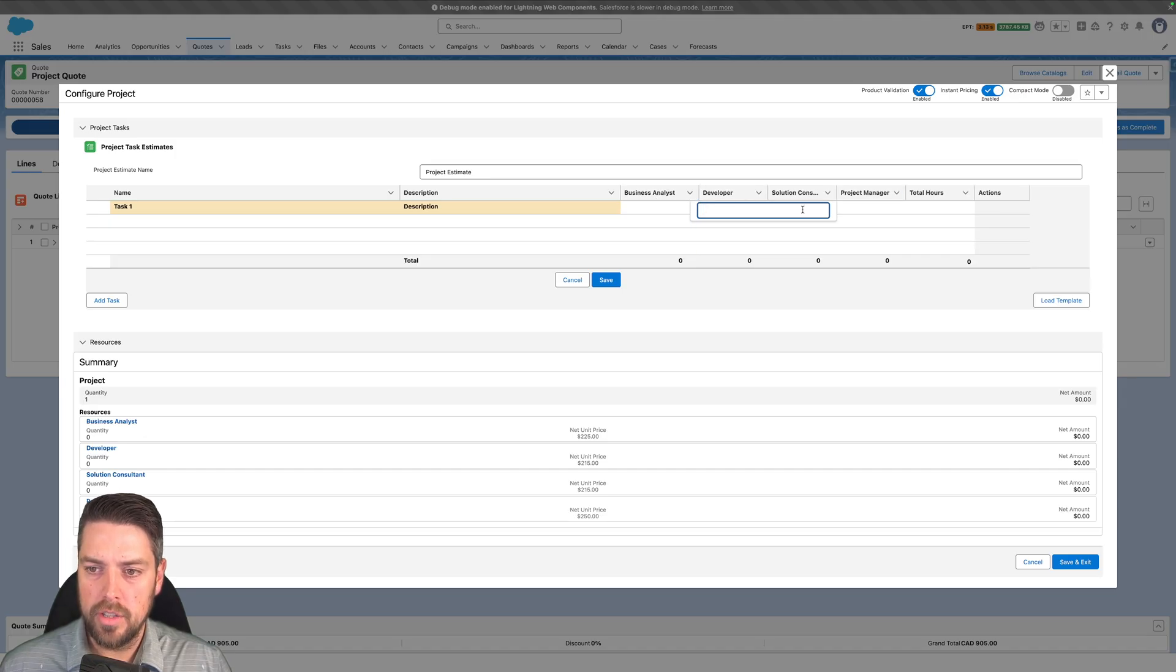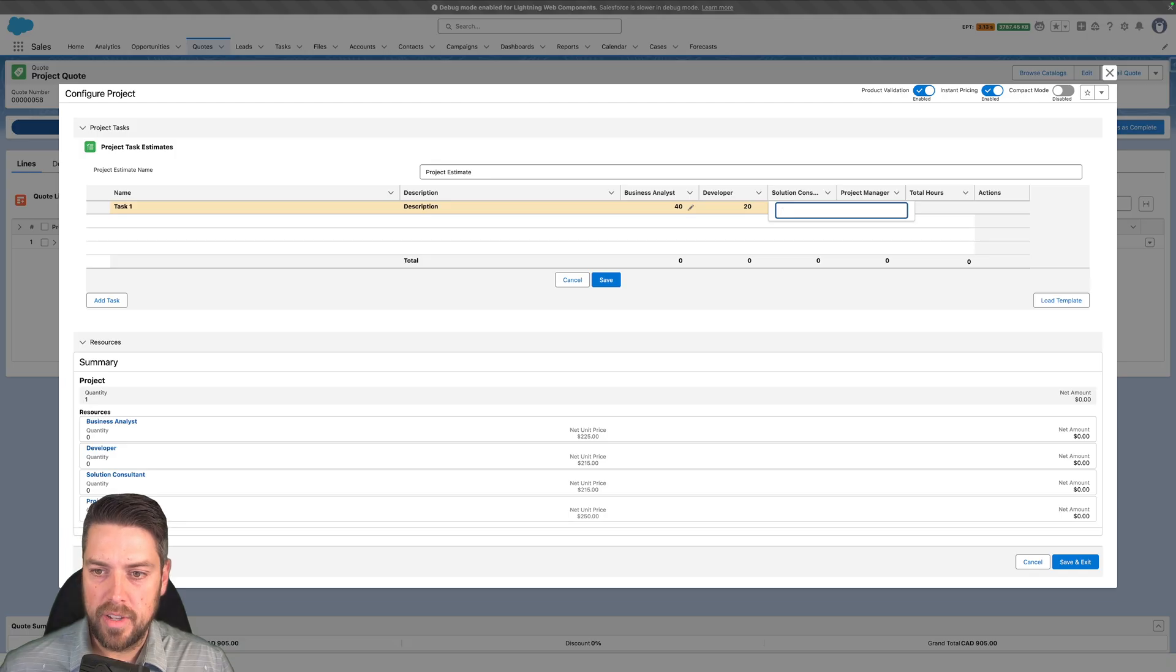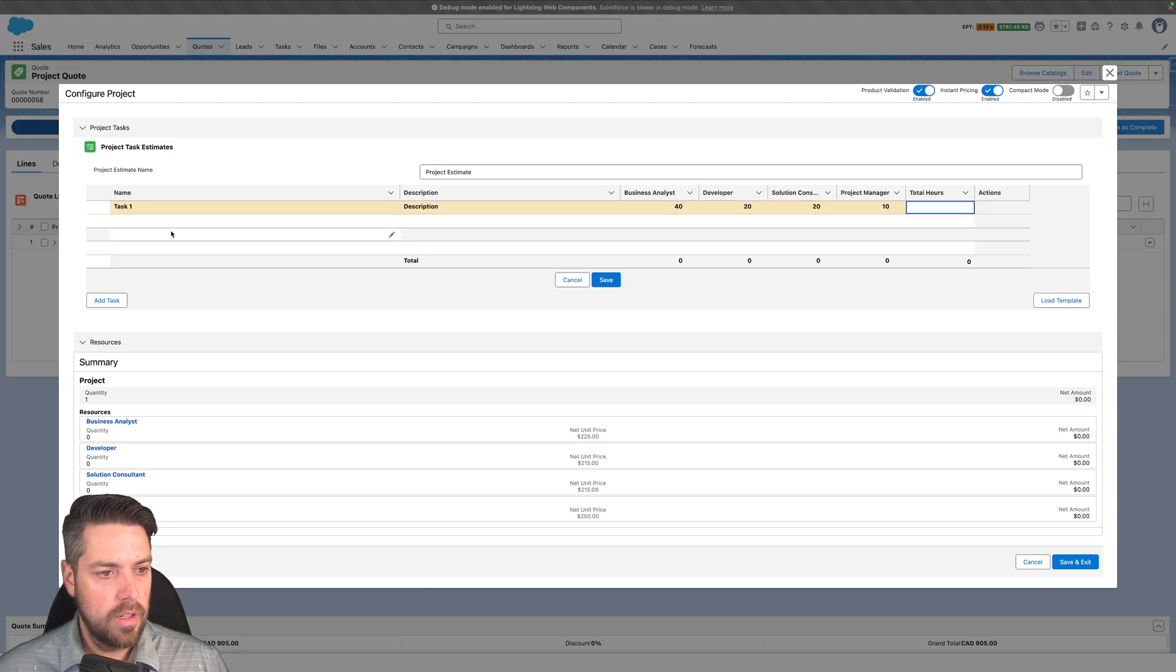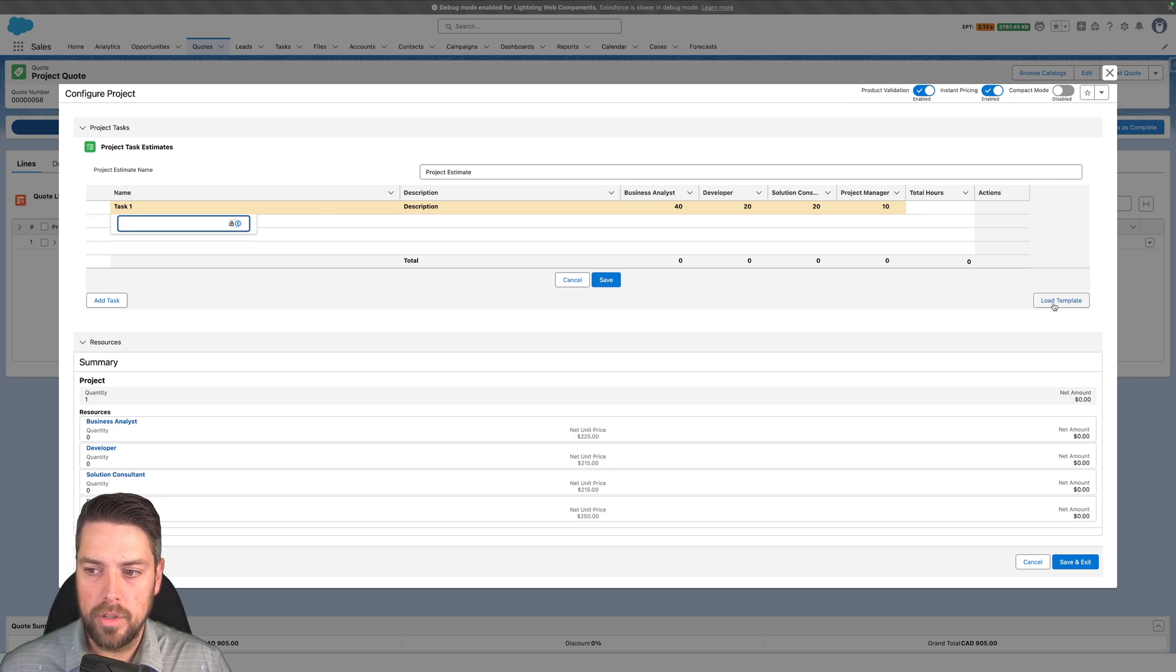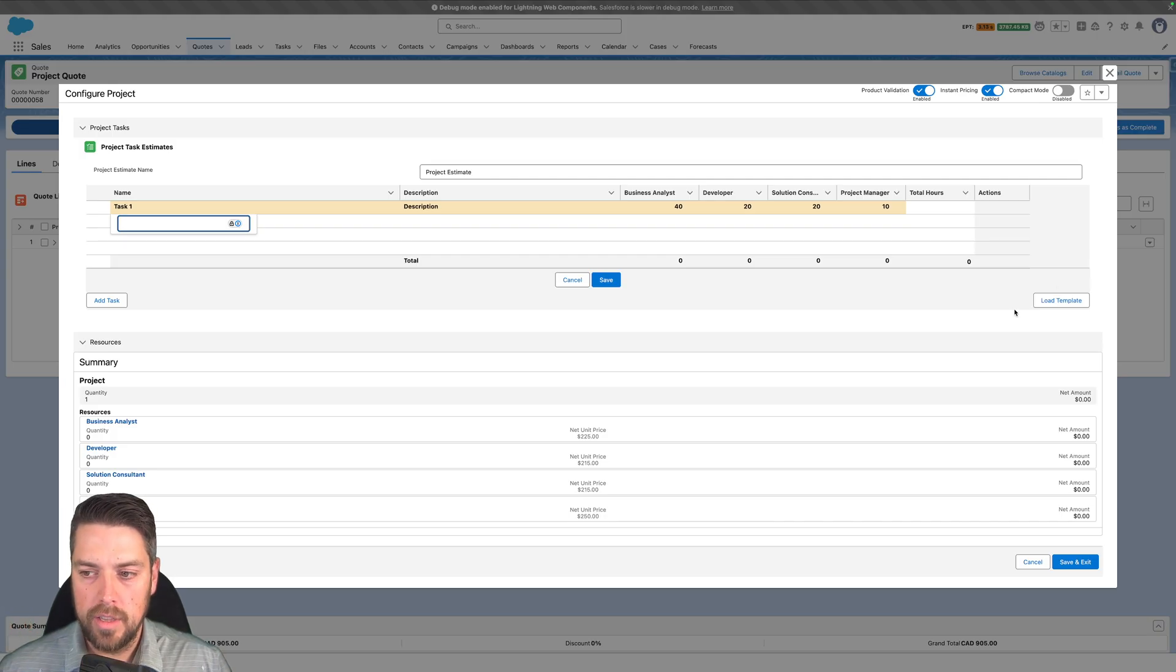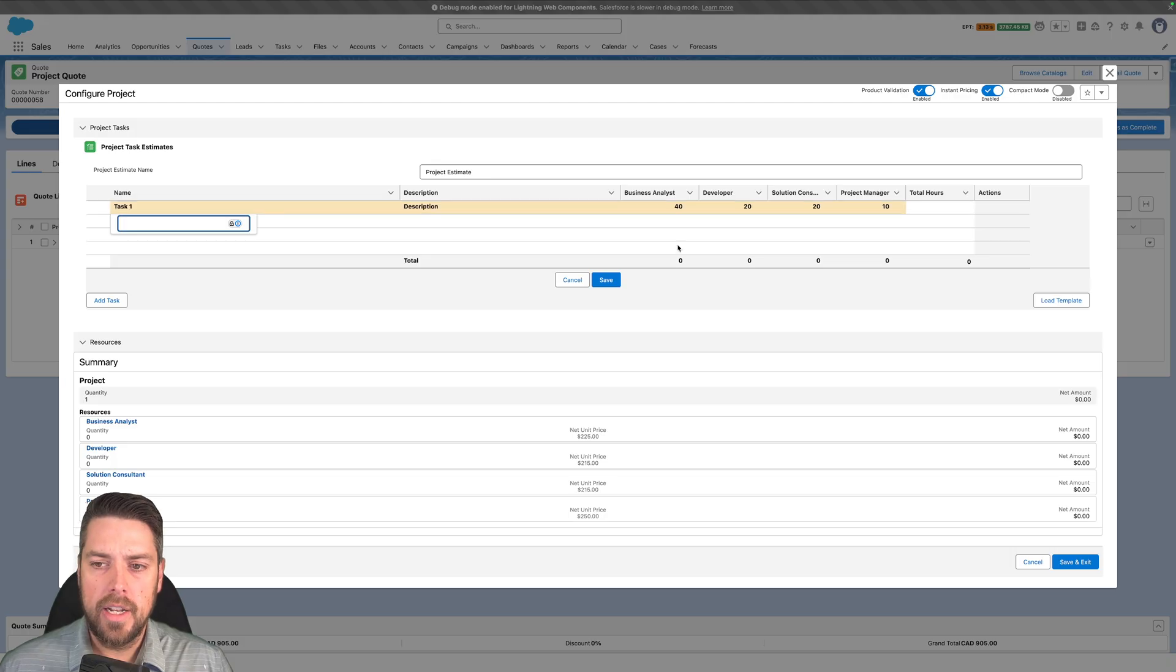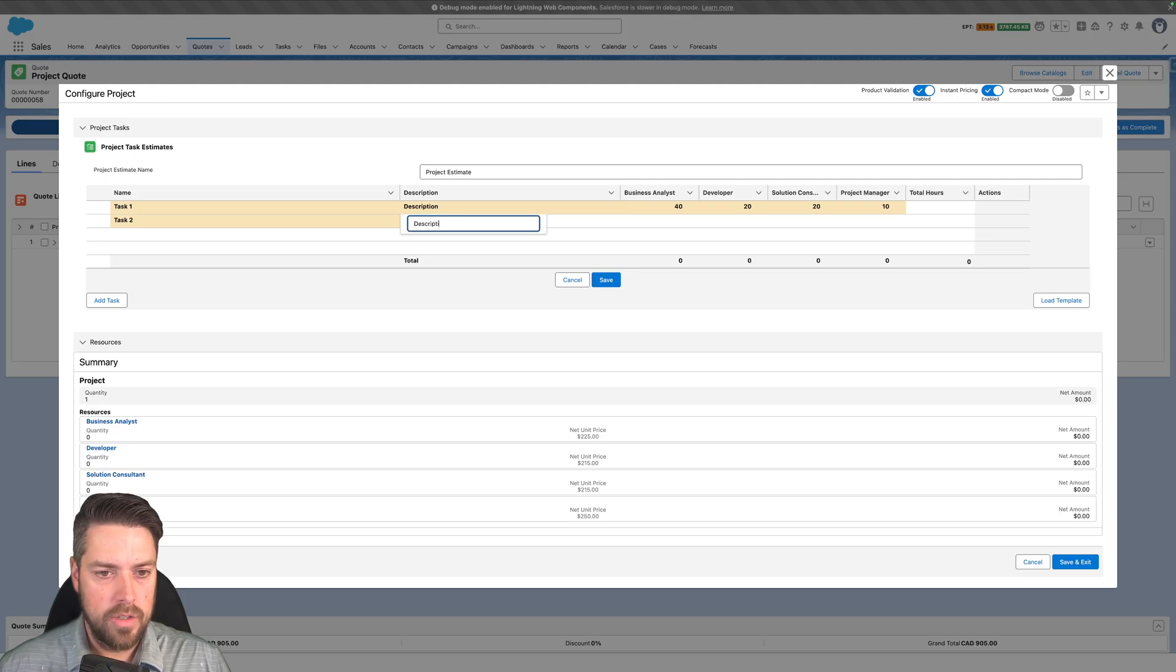I can go in and add the hours that would be relevant per role for that specific task and then work through the list of different tasks. We could also load a pre-built template if we wanted to. If you've got pre-built templates - project of type X, that's typically how we staff it - you could load that template, it's going to preload your tasks and your hours, and then you can modify those for that specific project. Simply add your different tasks and descriptions.